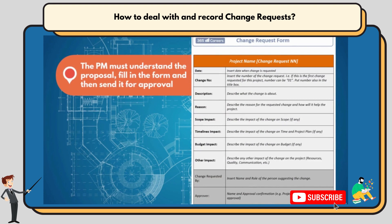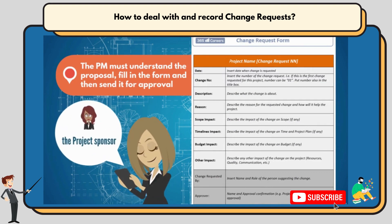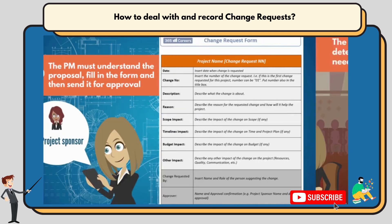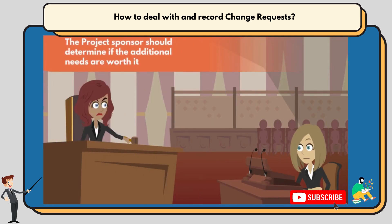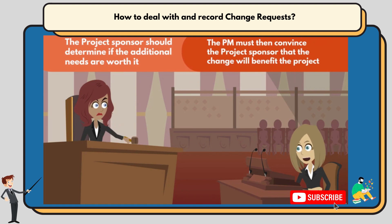The project manager must understand the proposal, fill in the form, and then send it for approval. Who will the project manager send the change request form to? The project sponsor, of course. Since they have provided the needed resources, they should also determine if the additional needs are worth it. If the project manager has concluded that the change will benefit the project, then they must convince the project sponsor.